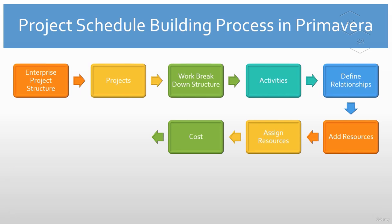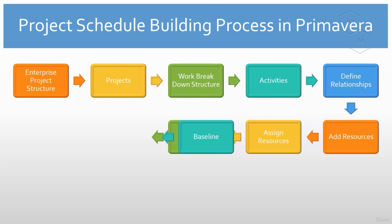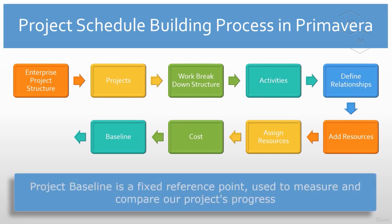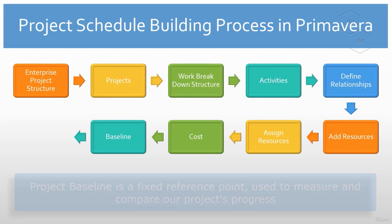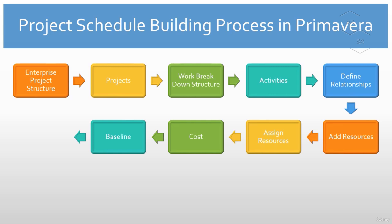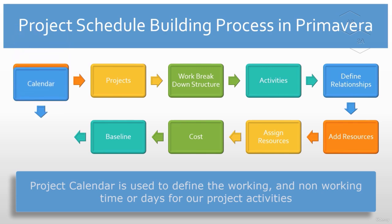Then, in order to monitor and observe any variations from the original plan, we will create, set and assign project baselines. A project baseline is a fixed reference point used to measure and compare your project's progress. To define working and non-working time or days for our project tasks, we will work with and assign calendars to our projects.